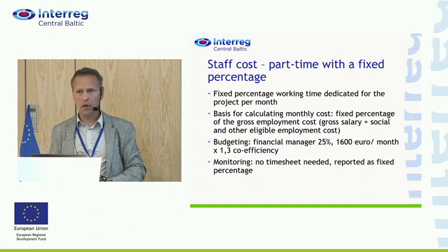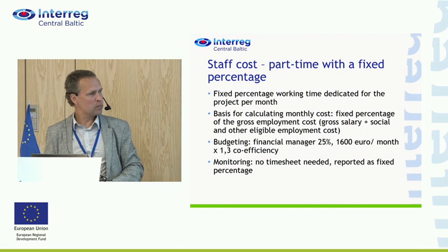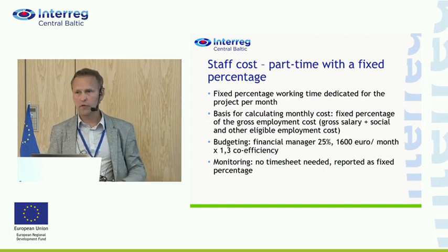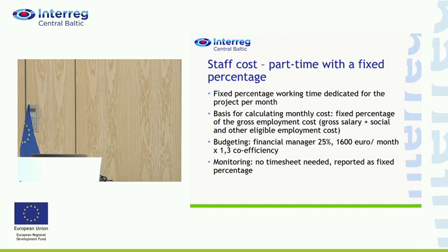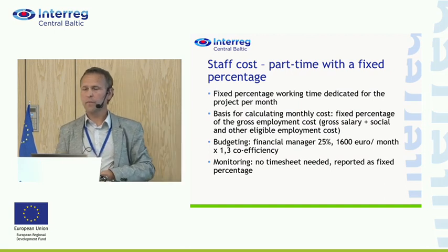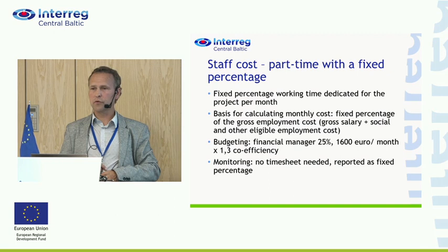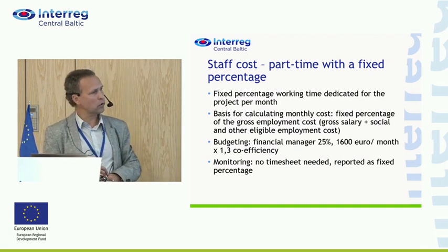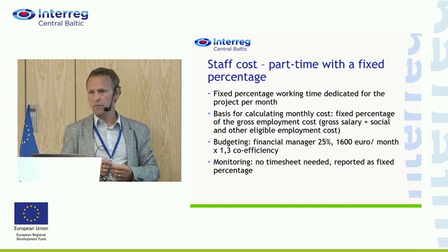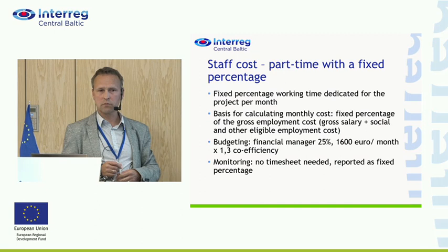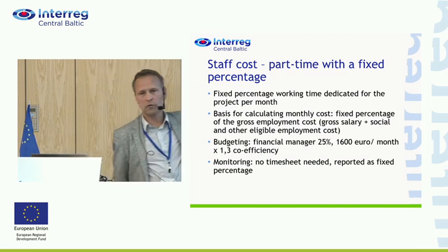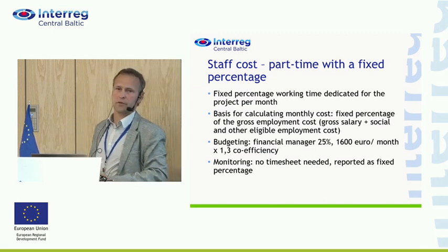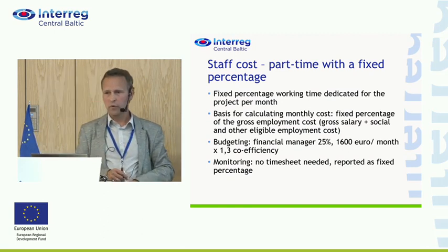Monitoring: we don't require timesheets, exactly for that reason, that we count on you reporting 25% or 50% of working time. It is fixed in the contract, of course. In the contract you sign for working for the project, this work time and salaries should be mentioned as well, and calculation and reporting will be accordingly. So we don't need timesheets, we don't need exact data on how many hours somebody worked.